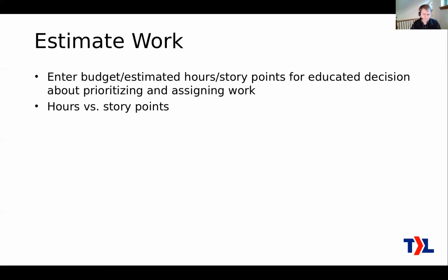So how much work do you estimate? Well, I would say you only need to do the work you think is going to be done soon, where you get to define what you mean by soon. It could be a couple of days of work, it could be a week, could be 2 weeks at the most. If you're using Kanban, you just need to make sure that the engineers don't run out of work, so keep those queues filled. For Scrum, it would be at least the next sprint's worth. So there, it would be 1 or maybe 2 weeks' worth.